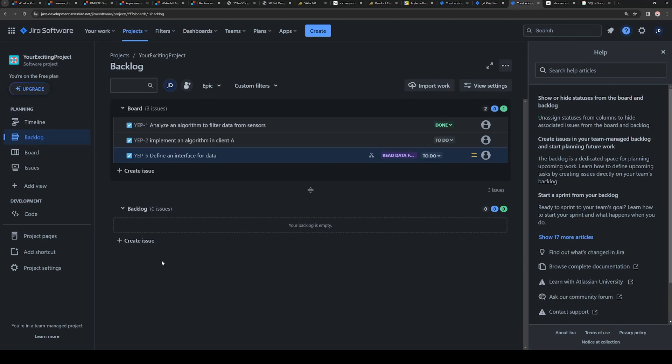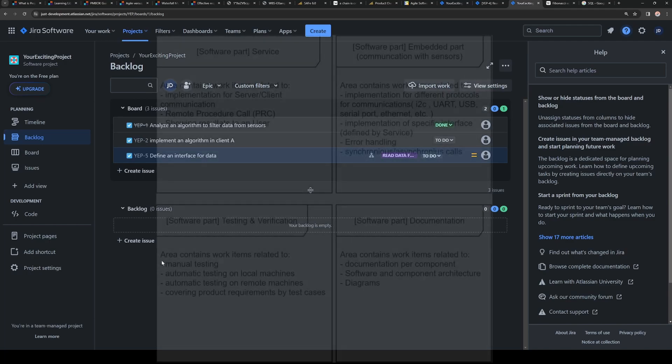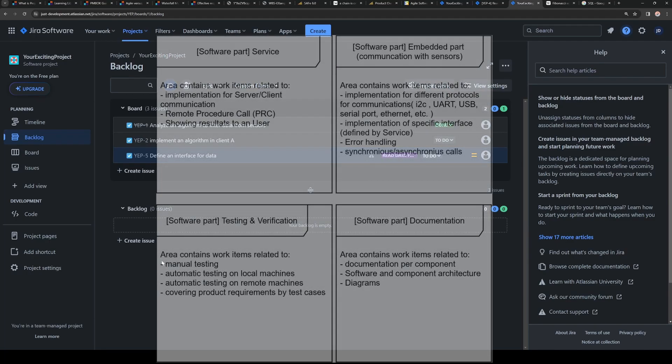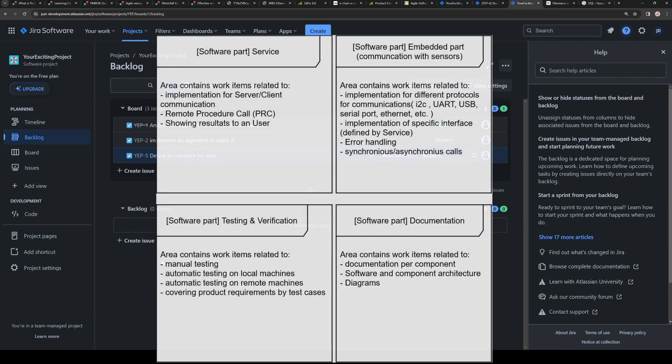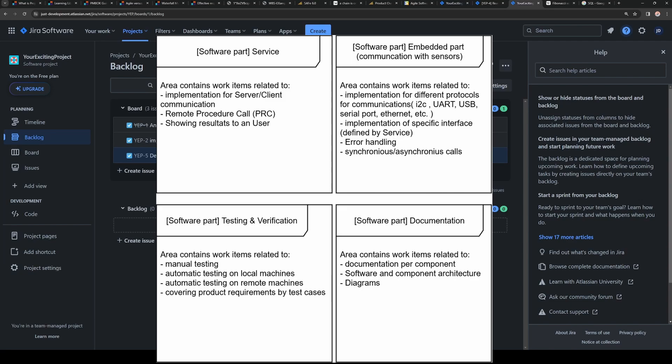It is the way how do you cut, or how do you split the stories. Because imagine that we have responsible areas in servers area, in embedded area, in documentation area. So we have four of them. We might split our work into these different areas.